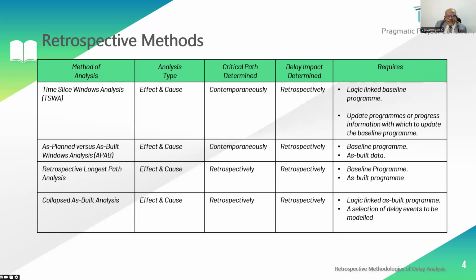And if it is an EPC contract, engineering procurement construction commissioning contract, we cannot say everything is predetermined, as compared with a bill of quantities contract. In a bill of quantities contract, so much scope and everything is already defined. Whereas in EPCC, we cannot exactly determine the total quantity as well as the execution part and procurement part. So a lot of changes are bound to happen.